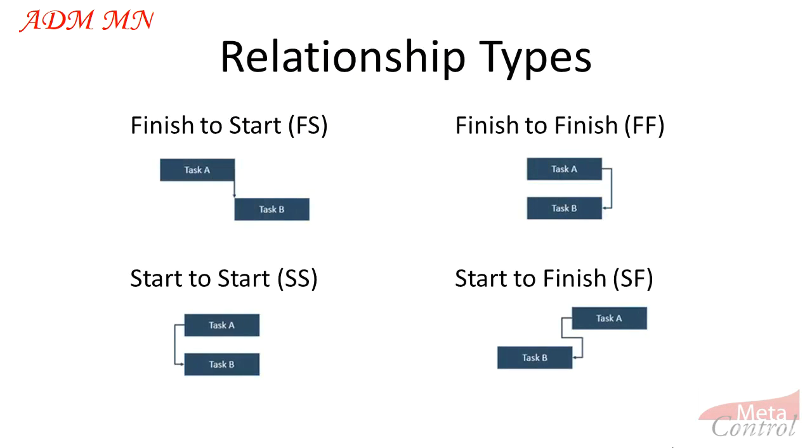In this lesson, I will teach you how to link activities in Tilos. The types of links offered by Tilos, and you maybe already know, are: Finish to start, when the successor task starts right after the predecessor task finishes.